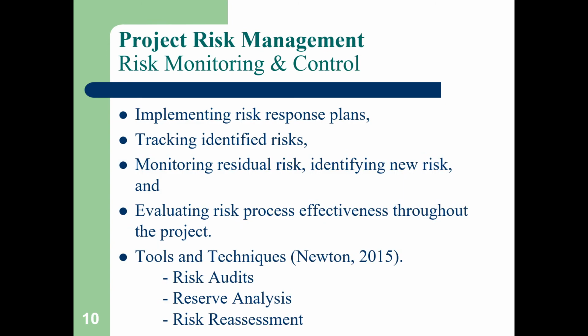So risk monitoring and controlling. This is implementing a risk response plan, tracking identified risks, monitoring residual risks, identifying new risks, and evaluating risk process effectiveness throughout the project. Some tools and techniques used are risk audits, reserve analysis, and risk reassessment.